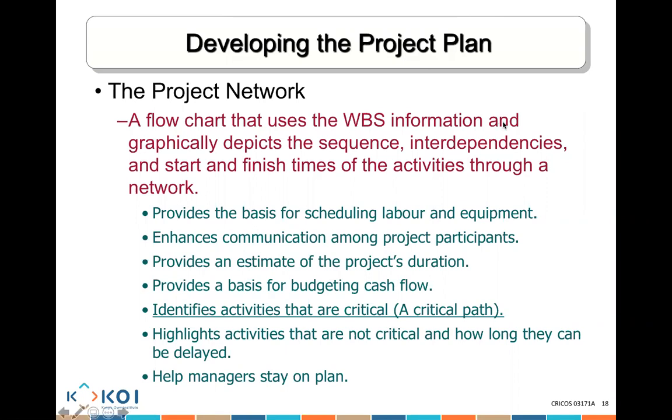It identifies activities that are what we know as a critical path. What is a critical path activity? It is an activity that cannot be delayed. It is an activity that, if you delay it, is going to delay how long the project is going to take to complete. So it's an activity that should not be delayed. Whatever you do, you try to ensure that that activity runs on time.